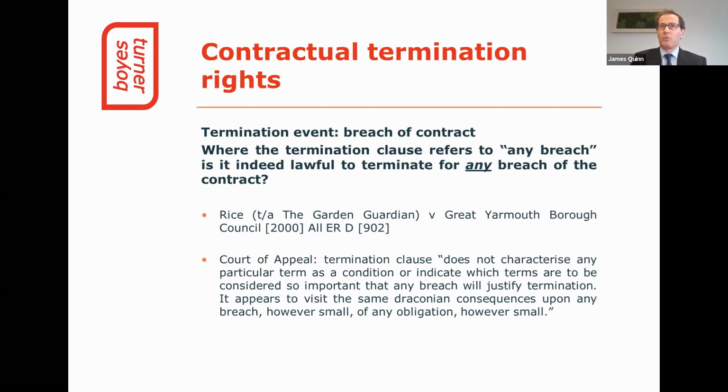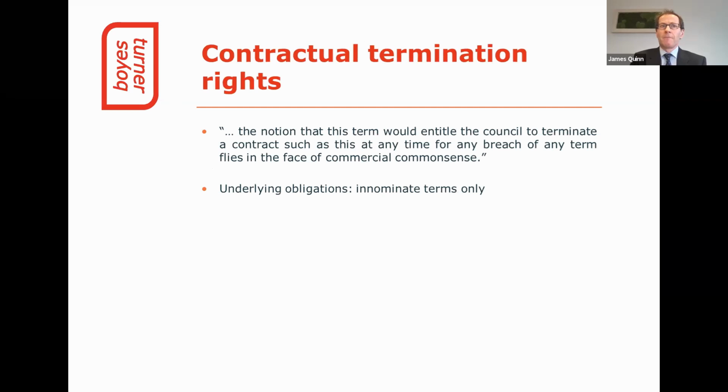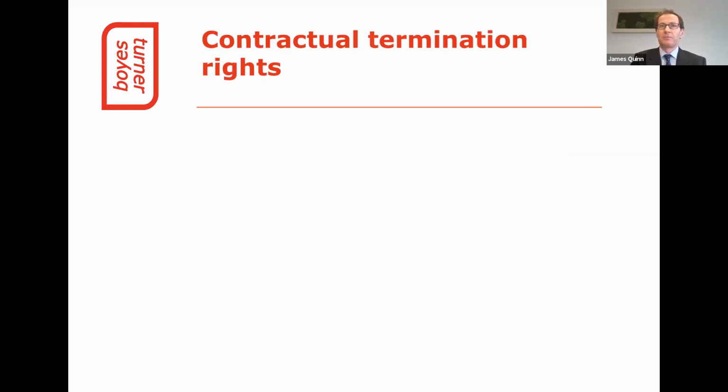As we see on the slide, the court pointed out that the termination clause did not characterize any particular term as a condition or indicate which terms were so important to justify termination. And the Court of Appeal held that the suggestion that the council could terminate for any breach of any term flies in the face of commercial common sense.